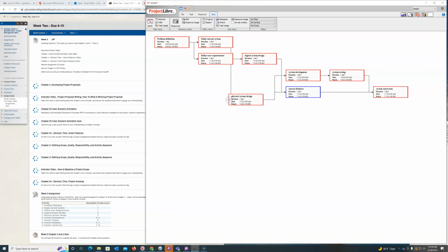You'll discover in here, I can move these around, but what we're still showing is that these elements require 7 and 8 to be done. These can't start until 1 is finished. So as we get more and more complicated, a tool like this is really critical to help you create some of those and try to manage them.